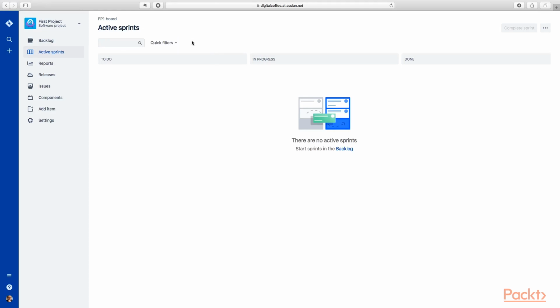And a lot of times what we'll want to do is set up all of the different team members that are going to be working on stories in this sprint and put them across the top here, so that as we're going through a daily Scrum, we can click on each name and look at just the items for that person and try to figure out if there are any impediments, right? Which is the role of the Scrum Master as we move through a Scrum sprint.